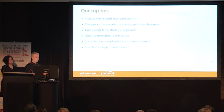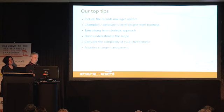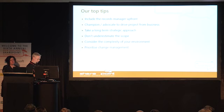I think one of the good things we did was take the approach of implementing something, evaluating how people worked with it, deciding whether it's successful or not, and then confirming from there what we would deliver next. And so far, that iterative feedback loop has produced some very positive responses from our users.